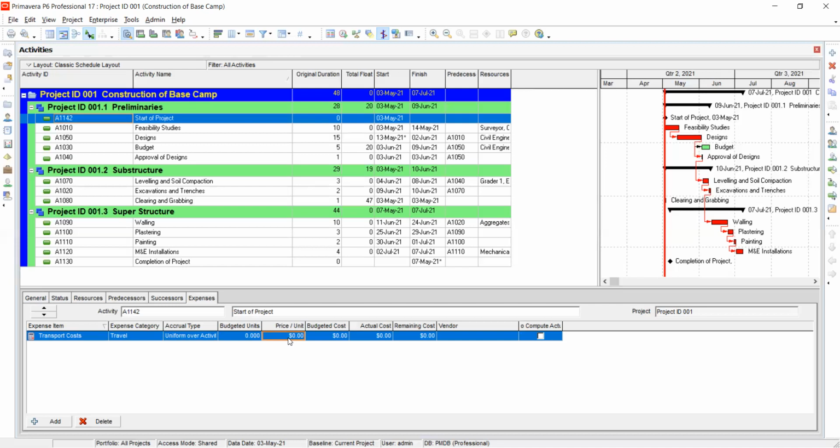Yeah, you can enter the money per unit, or you can just enter the budgeted cost, like how much it is going to cost you overall. For these ones, they can be entered, or you can just enter one, because this is budgeted cost, then actual cost, then remaining cost. But you may find that you only record either the actual cost or the budgeted cost. In case you find that in your scenario you need all three, you can put that we had planned to spend $100, but we actually spent 700 and we've already paid 400. So the remaining is 300.